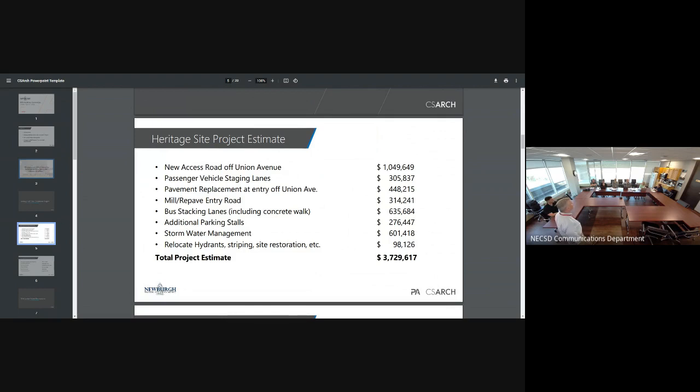So we're reducing the figures of the capital bond project to some degree? We've made some adjustments because the actual paving of that emergency access road behind the building was not incorporated into the bid. So while we're taking some scope out, we are now putting that scope in. So I wouldn't anticipate the total project cost changing.